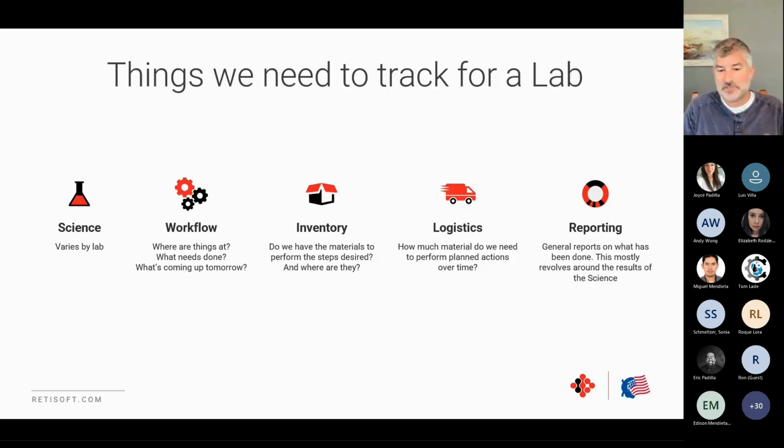So let's talk about logistics as an example. What volume of consumables do you normally use a month? What's the lead time on ordering? What's the planned consumption of those consumables during the current lead time or the next lead time? How much do you currently have on hand? You can just over order all the time, and that's an option, but it still doesn't mean you won't run out.